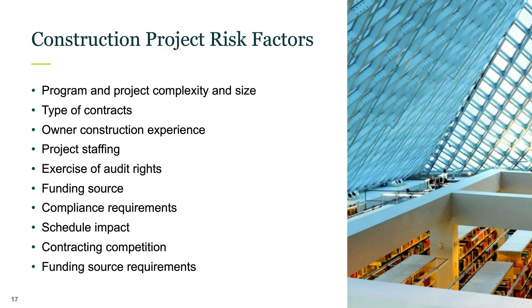And another one, we'll do the funding source requirements and compliance requirements. A lot of organizations get bond funds that have certain requirements to ensure that their bond remains tax exempt, for example. So you've got to know where the money's coming from. Is it for an allowable use? And if you don't know these requirements and you're spending money on non-compliant expenditures and your project goes over, you could be putting your organization at risk.